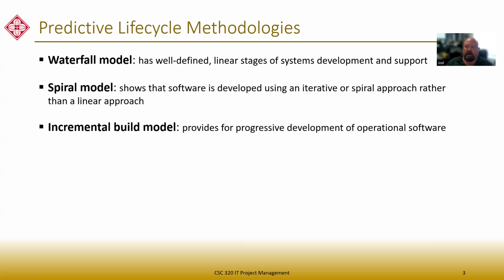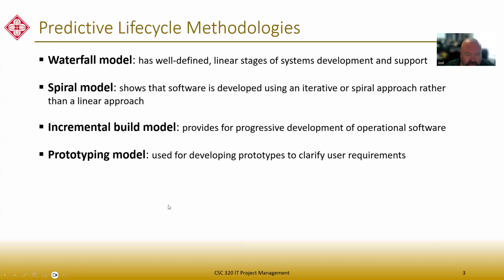Okay. So a hybrid model, the overall methodology, incremental, individual phases could look like waterfalls. And then inside of the waterfall will have its own individual phases. Right. So you can see how you can really mix and match these things together. Another really common thing is prototyping, and we've all heard what that is. We know what that is, right? So it's a smaller scale and it is designed as a proof of concept kind of vehicle. Okay. Here's this new technology. We don't know if it's going to work.